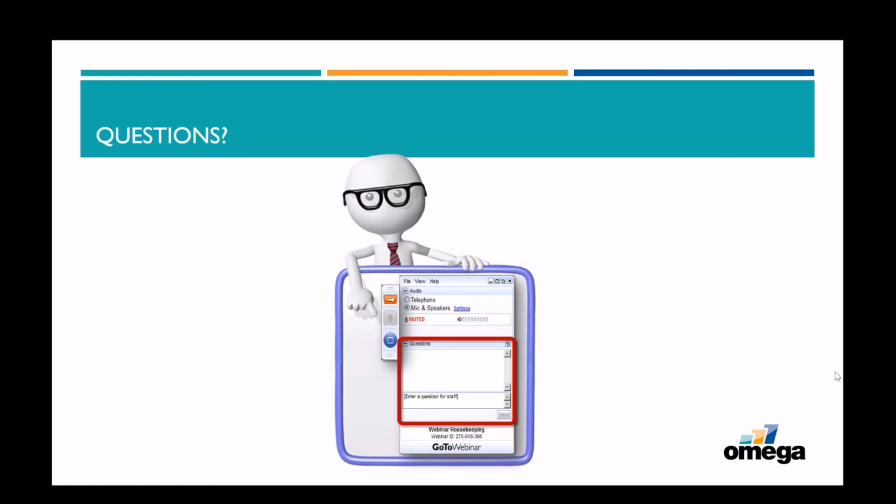The first question we had was regarding some of the example data we used, and they are referencing that we used within the same project the same inception date to normalize the cost from. And the question is, does that have to be the same date? And no, you can add in different inception dates on a cost line item by line item, and Pims will normalize each line item individually.